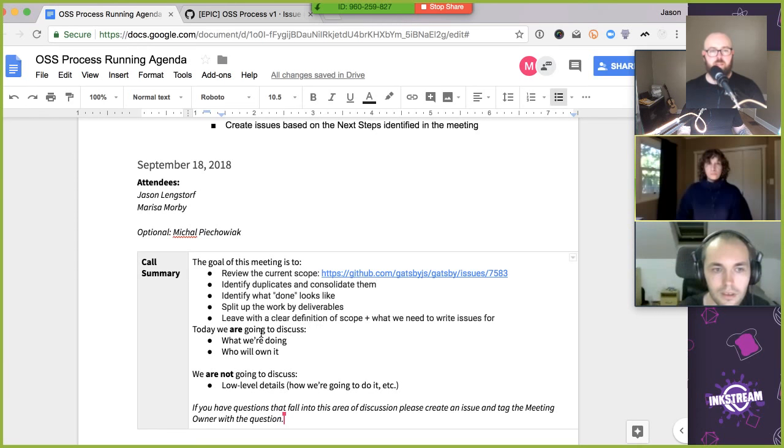Then decide what our scope is going to be, so we know what we're working toward. Split that idea of done up into deliverables with owners, which at the moment are going to be you and me, Marissa. The intention is to leave with a clear definition of the scope and what we're attempting to write issues for.